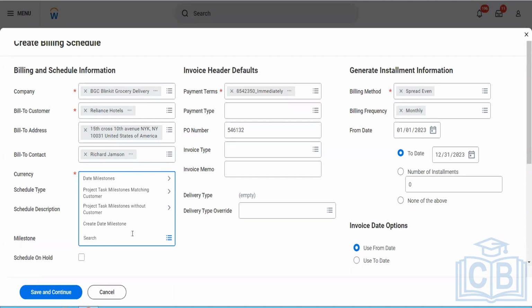In the construction industry, they have milestones: they set up the first floor, then they ask you for some amount from your home loan saying that the first floor is set up, then the second floor, third floor, or the ground floor tile work has been done. These different milestones are discussed with you earlier when you buy the house, and it is also mentioned in your home loan agreement that you have to pay whenever the first part or third part is built.